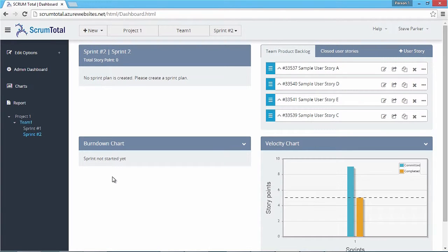Sprint is a term used in the Scrum framework to describe the basic unit of development time. In most cases, the duration of a sprint ranges from 1 week to 1 month in length. A project release is usually made up of several or many sprints. Note that a sprint can only be started by a Scrum Master or product owner. A developer does not have the right to start a sprint.